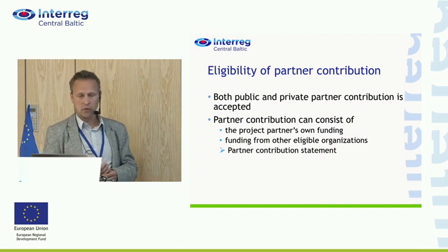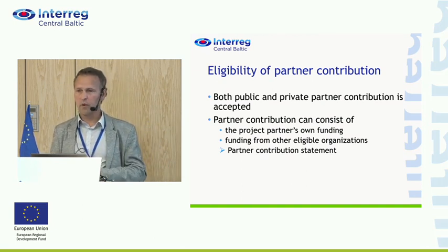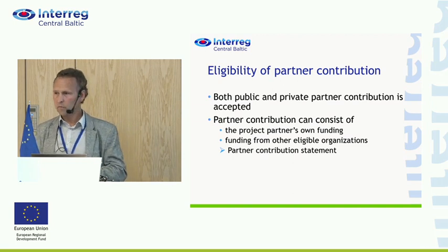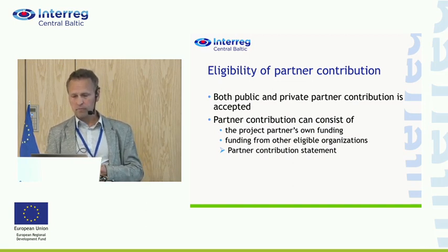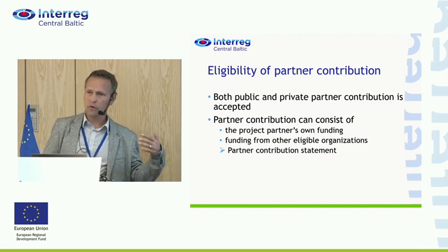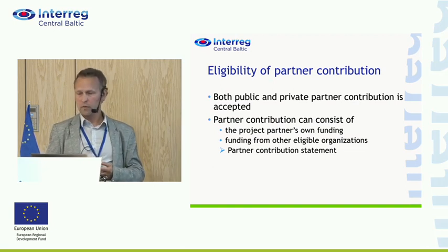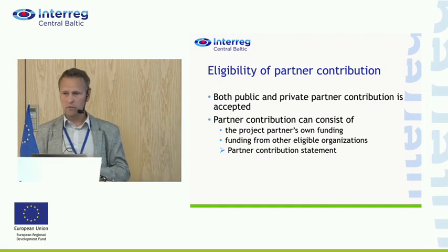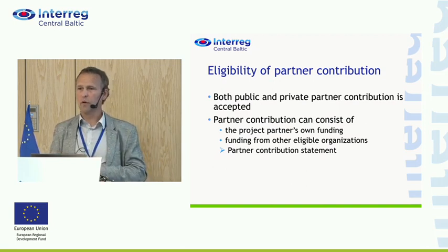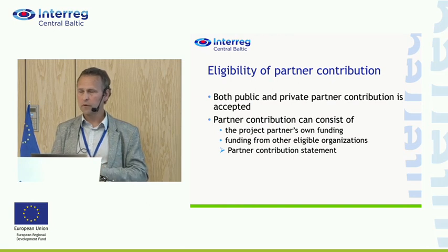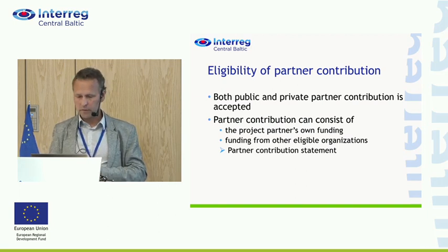Who is eligible? Ylari spoke about partners in general. Both public and private partners can participate and their contribution is accepted. Partner-owned contribution can be the project partner's own funding, or it can be from other eligible organizations as well. So basically, very roughly to say, we don't care very much where you get your 15 or 25% of your own co-financing, but you just need to have it.